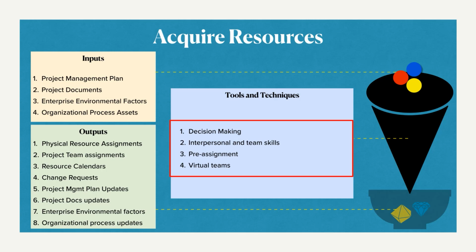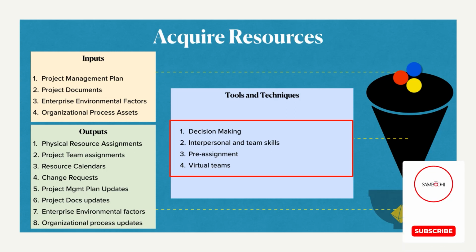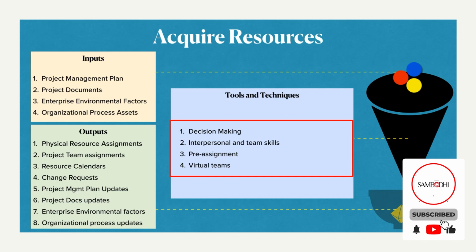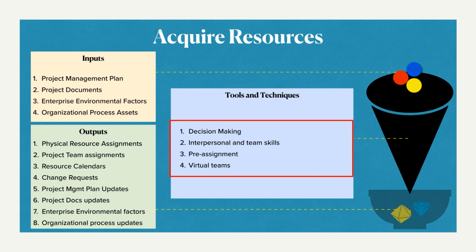We have to gather this information, right? So there are some key people and key machinery in the organization already before we start the project who cannot be left out from this important upcoming project. Like, for example, Mr. John. Mr. John is considered to be present in all the upcoming projects within that program, right? So such important pre-assignment of resources is done because they are key people for the organization. They have been here, they know the processes, they have worked from the ground level in many of the projects before. So this kind of information is very important. We cannot leave these kind of resources, right? So this pre-assignment is a very, very important thing for the project to run successfully.